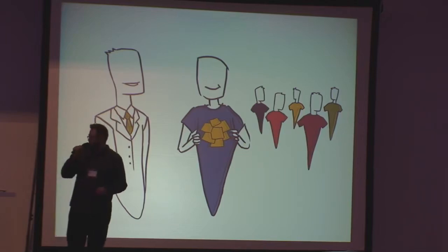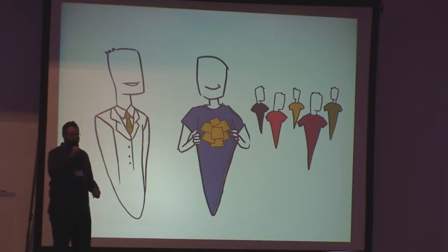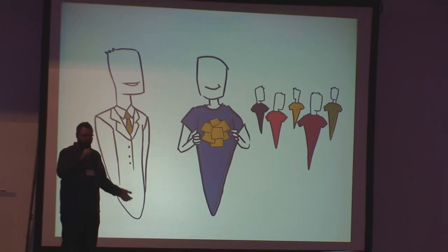And then finally, you have the team. This is a group of 7 plus or minus 2, so 5 to 9 team members that are supposed to be multifunctional. This can be developers, QA testers, DBAs, user interface, user experience designers, security designers or architects. And the idea is that they are self-organizing and they move to where the work is.